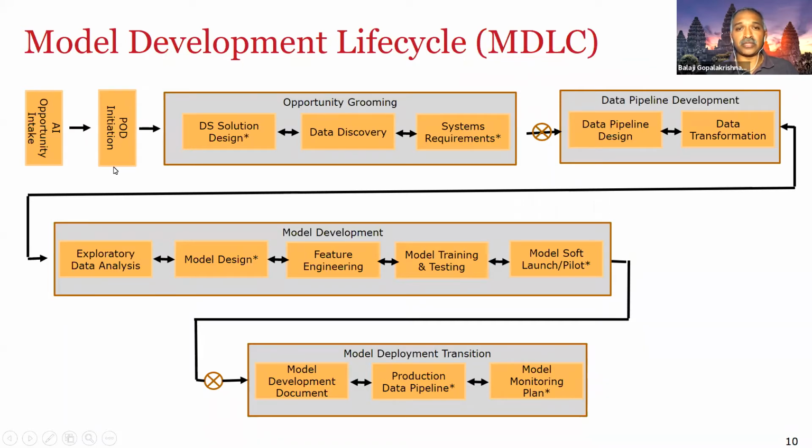And then the second important thing is, okay, now that we know that there is a problem that we can tackle using a machine learning model, do we have capacity to actually work on this? And here, when we say capacity, it is not just whether we have a couple of data scientists to work on this model. It's broader than that. We have to see whether we have everyone who needs to contribute to this project, which will be the data scientist. It has to be somebody from the line of business who is available.